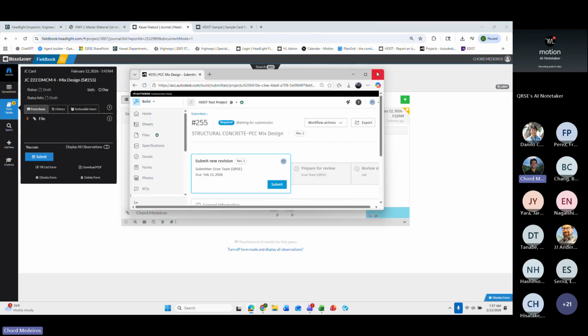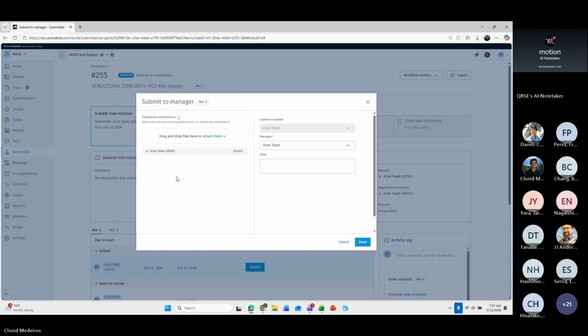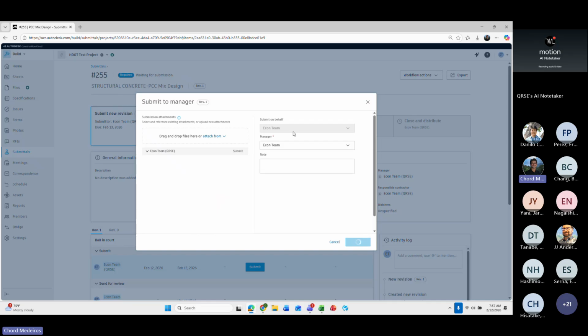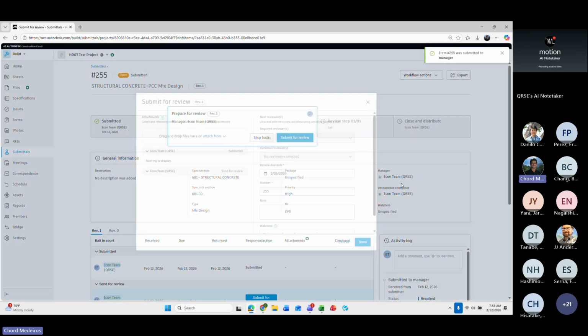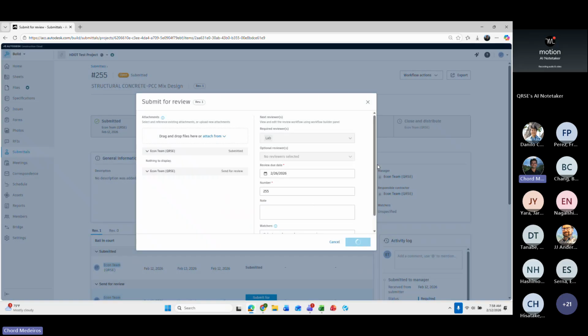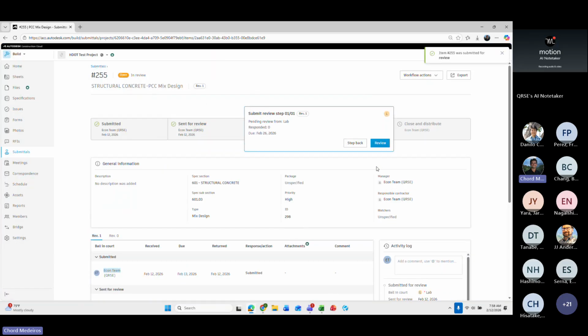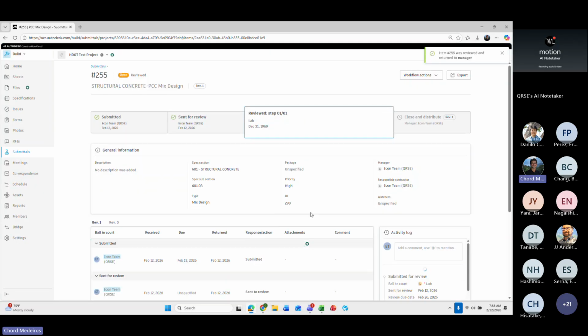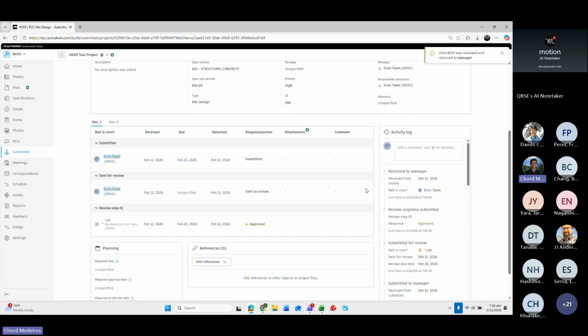Once you resubmit it to lab, obviously, put it into its proper state here so that we're connecting the two places together. I'm just going to push it through for the sake of time, because we only have 2 minutes left, but I'm going to submit it here, select review. When it finally gets approved or approved as noted or approved with conditions or accepted with conditions, then I will go back here. I will make sure that I submit the attachment.